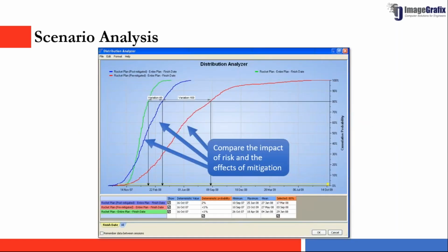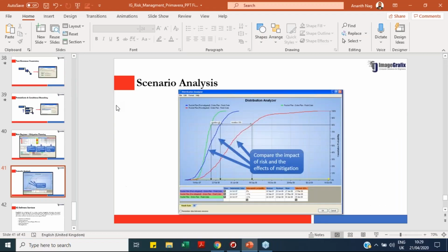So we can also have a scenario based approach. If you have a project baseline and you don't want to disturb that baseline, you can create multiple scenarios for this project, and analyze these risks and apply the risk analysis and responses so that your baseline remains the same, and you can do your analysis on multiple scenarios as well. So with this, I have completed the theory session. Now we'll go and see the practical session, how actually this is working in application.